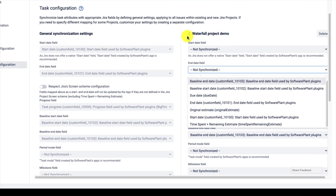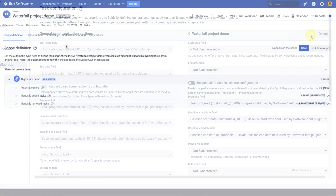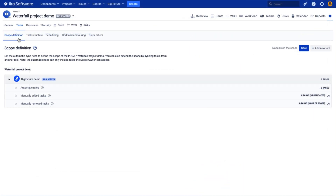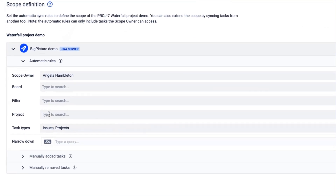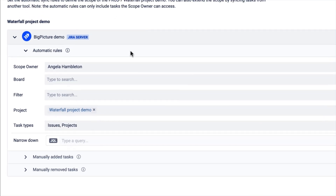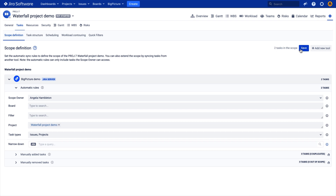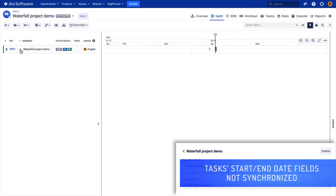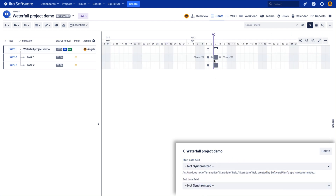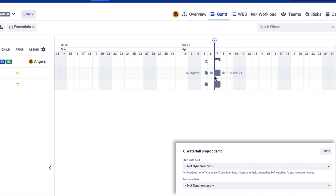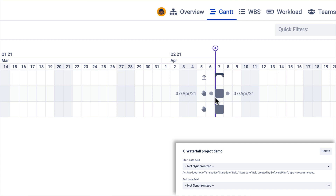Let's start with no synchronization. We are now in the Big Picture configuration Tasks and Scope Definition page, where we can define the scope — the set of tasks that we want to work with. I'll pick the project, and I already have my two tasks in scope. Let's save them and see what happened. We are now in the Gantt module, and the tasks were added on the current date, because the start and end date were not set for these tasks — there were no date estimates. In that case, the app will use the available date, which is the creation date.